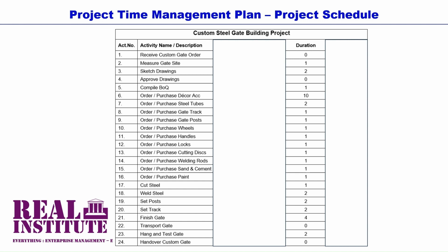Similarly, if the individual project activities' durations were overestimated during planning, then the project manager will be caught again by the waste of costly resources that sit idle waiting for preceding project activities to be completed. That is, the project will be overpaying for resources, in particular the human resources, resulting in a costly and inefficient project budget. Such an indictment on the project manager is undesirable.